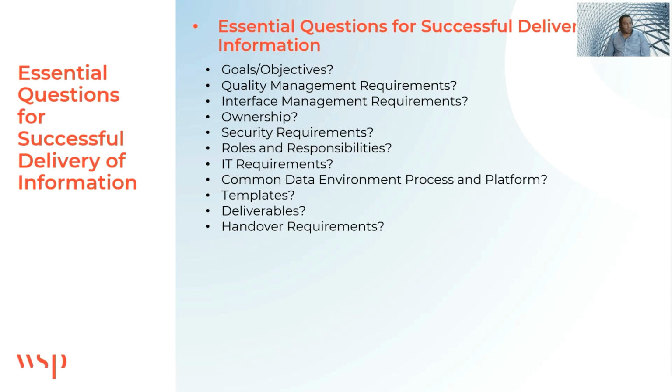Are there any security requirements in the project? What are the roles and responsibilities for every stakeholder? So for example, if you have a management organization, or if you have an additional cost consultant, what's the responsibility of each party? Who will be modeling, who will be reviewing, and so on.